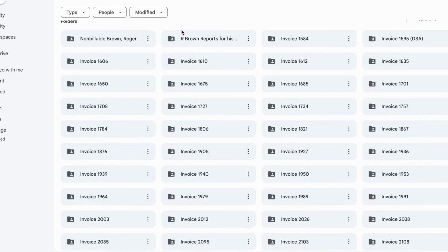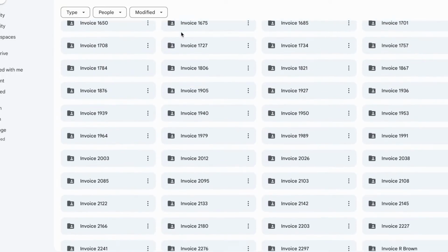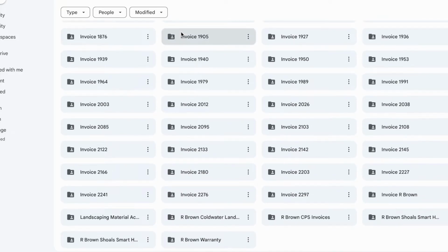And also, we do our invoicing through QuickBooks. We're a cost plus builder, but when we invoice through QuickBooks, our invoice actually just has the accounting codes that whatever material or labor got assigned. But if you open up Google Drive and go to the invoice folder that correlates, there's actually a scanned in receipt of every item on that invoice. So that helps with the transparency for sure, but also just keeping everything organized because it's very searchable at that point too.